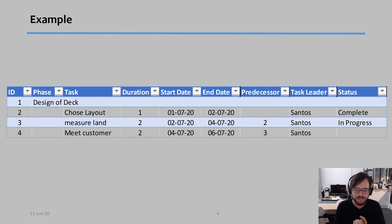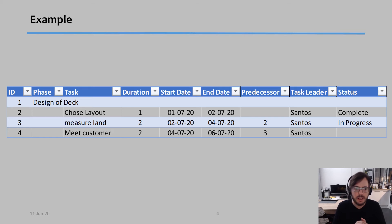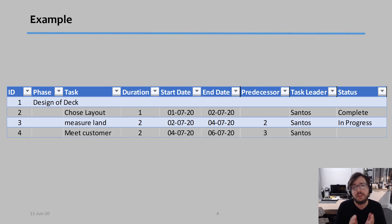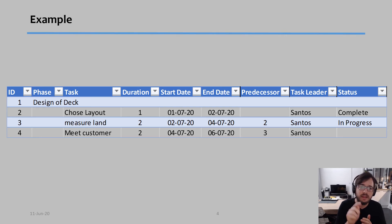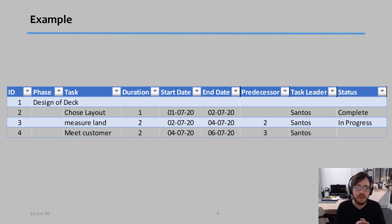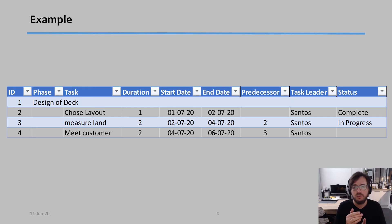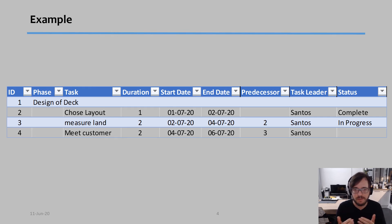So task two, identifier two or task two, they belong, task two, three, and four, they belong to phase one. And phase one, the ID is number one. So these three tasks, basically, I can only start each one after I finished the previous one.